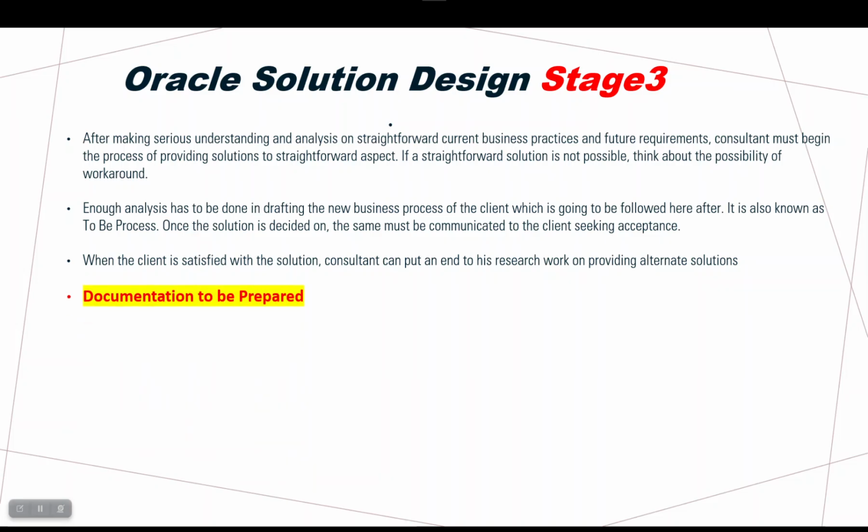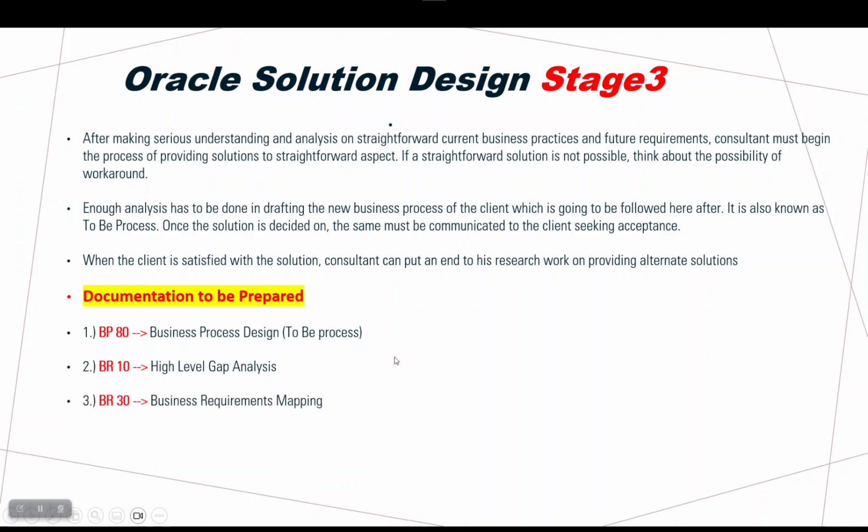What is the documentation to be prepared from the solution design stage? BP80 as a business process design, which is To-Be. The earlier stage is As-Is; the future is To-Be. PR100 high level gap analysis. PR30 business requirement mapping. MD50 application extension functional design.